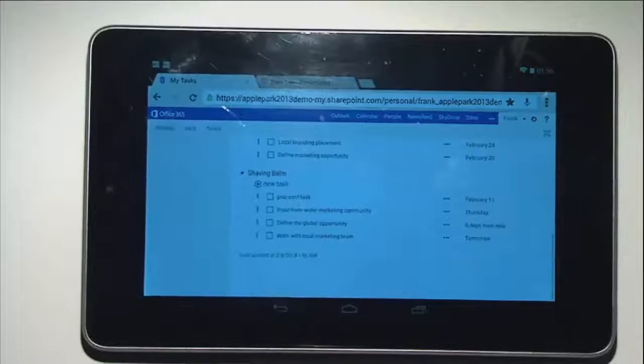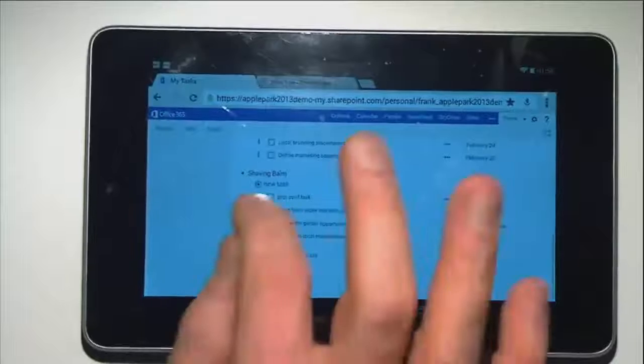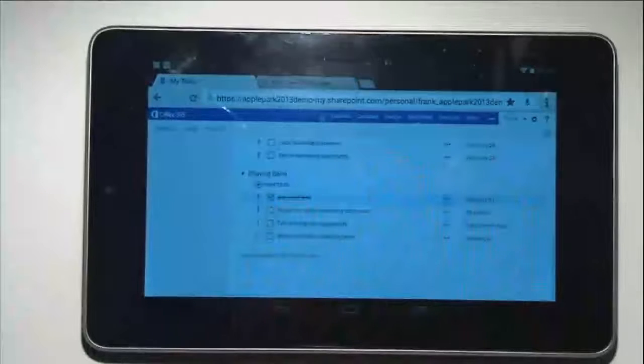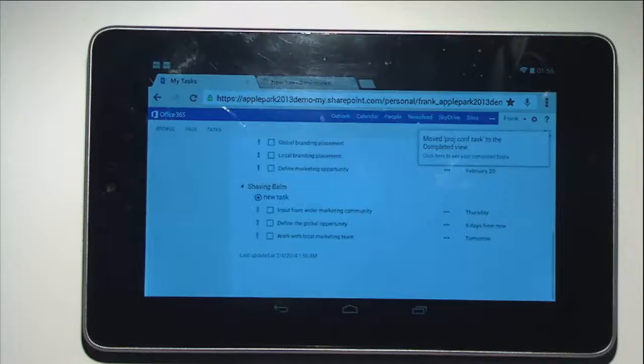Now this is much easier because I can say, well, that task there is done. That's it. Don't need to do anything else. I've got a little whirly thing on the right-hand side, and it disappears. Now, depending on how I've got SharePoint Project Server set up, that task will be auto-approved, the project will be published, and that task has been updated on my project plan and is available in the Project Center. Okay, so that's a really neat thing.